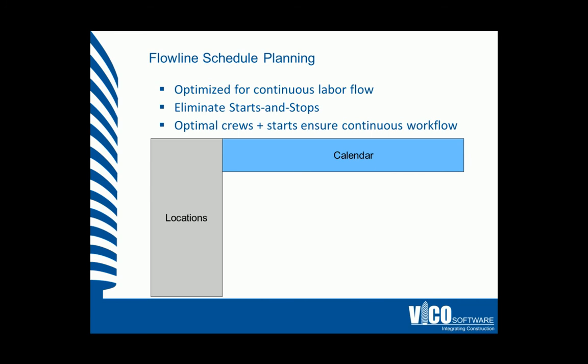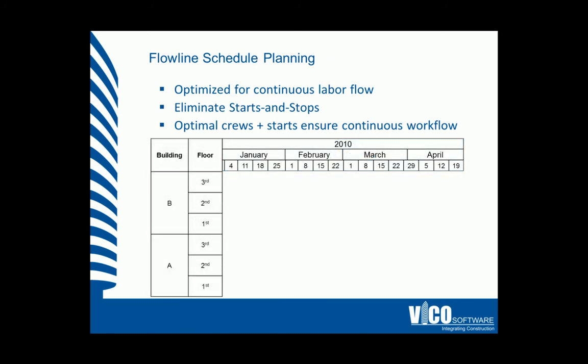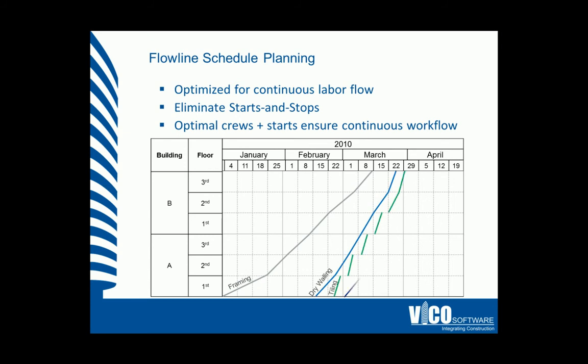As we discussed in the Level 4 vignettes, on the left-hand axis we have the location hierarchy. In the top row we have the calendar. We can then track each activity through each location over a time span. We have four activities here: framing, drywalling, tiling, and priming and sealing. As you can see, the green tiling activity starts and stops. This introduces risk to the schedule through demobilizations and mobilizations of this crew. We also have additional waste between the framing and drywalling activity. This waste is a cause of location and time delay that could be absorbed by crews working within this time span.